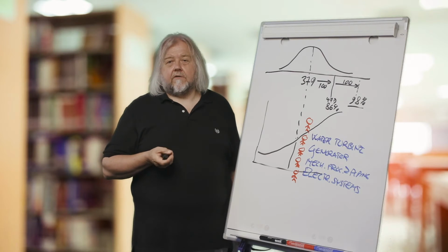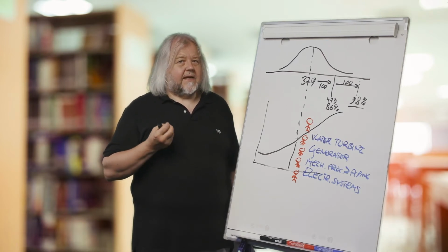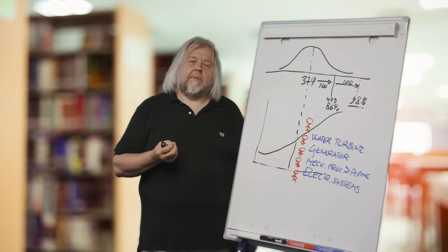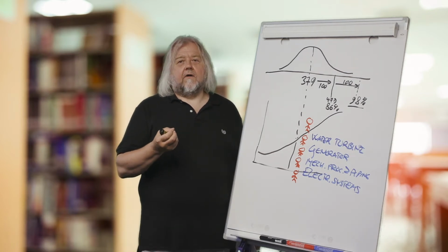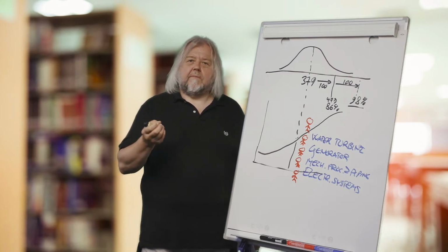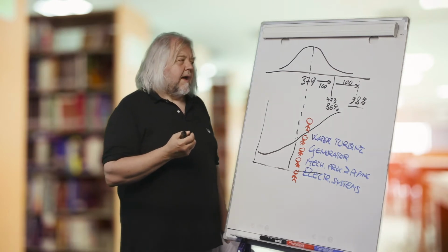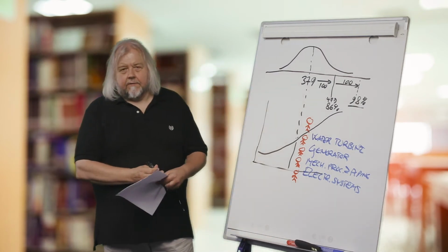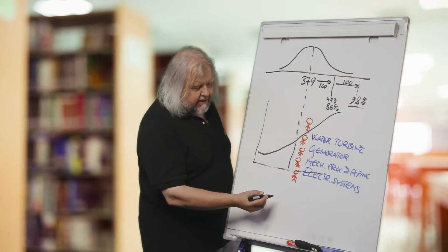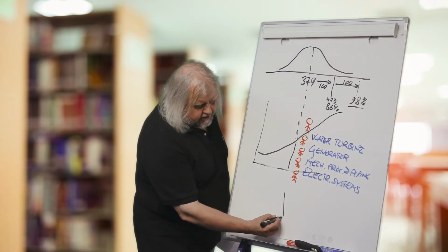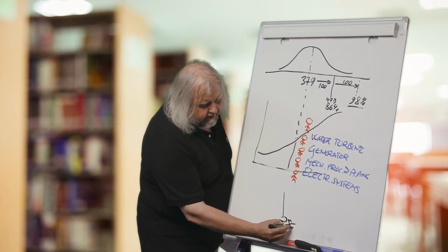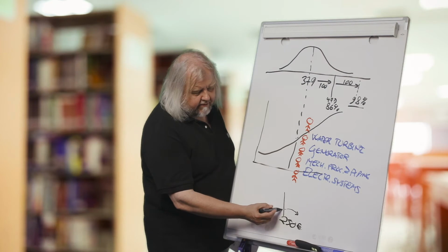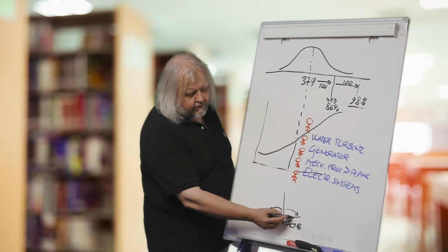But still, human beings are not very good estimators, and these estimates are subject to various kinds of biases. For example, people might be very overconfident about their estimates. There might be optimism, there might be groupthink, and so on. And especially when producing the 3-point estimates, one phenomenon that very often happens is that people anchor to the first value. For example, if we provide a value of 250 euros, that serves as an anchor, and people cannot see a variation very far from that anchoring value.